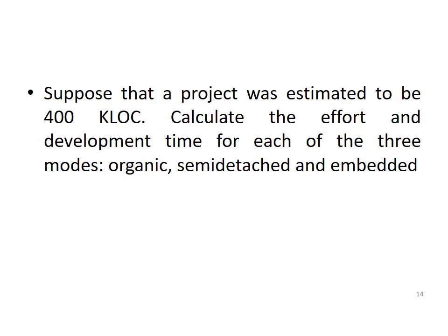Then we are moving to the problem section. Suppose the project was estimated to be 400 kilolines of code. Calculate the effort and development time for each of the three modes: organic, semi-detached and embedded project. Here the size is already estimated as 400 kilolines of code, and from this we can categorize our project as an embedded project, since if the size is greater than 300 kilolines of code, that project is of type embedded.